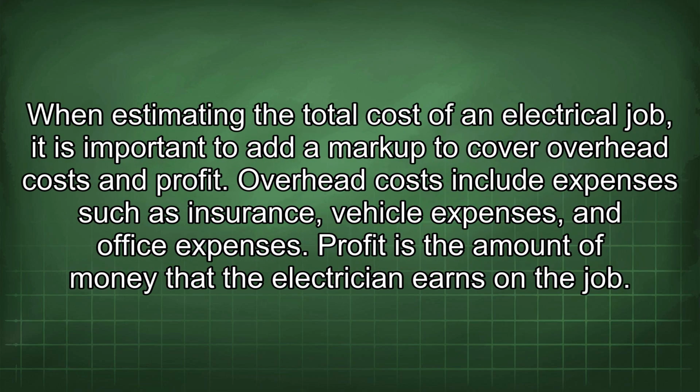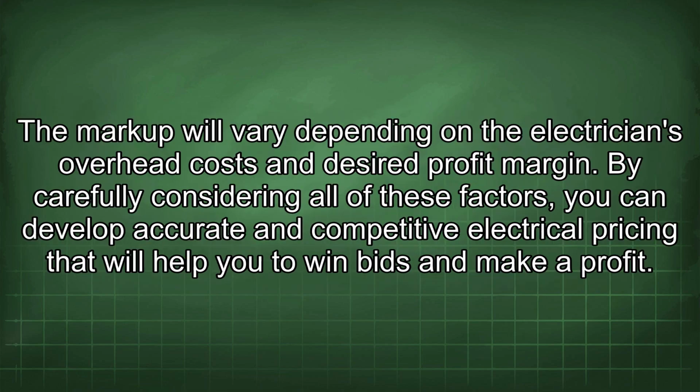When estimating the total cost of an electrical job, it is important to add a markup to cover your overhead costs and profit. Overhead costs include expenses such as insurance, vehicle expenses, and office expenses. Profit is the amount of money that the electrician earns on the job. The markup will vary depending on the electrician's overhead costs and desired profit margin. By carefully considering all of these factors, you can develop accurate and competitive electrical pricing that will help you to win bids and make a profit.